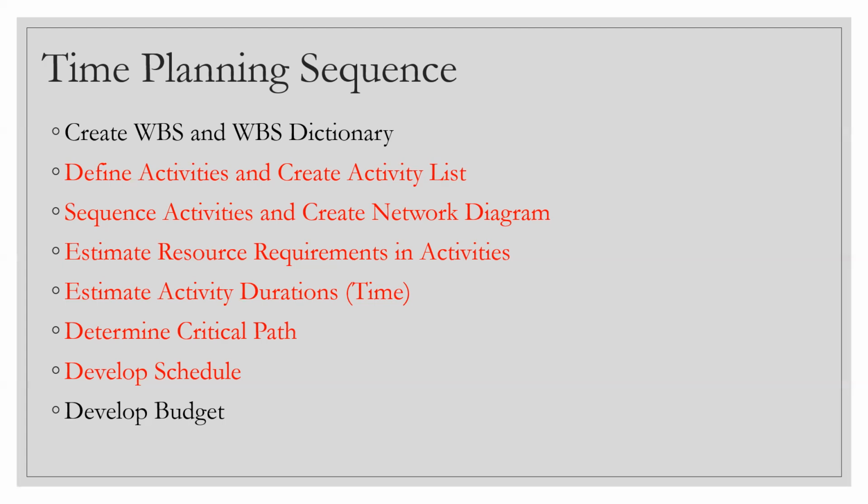And with that, you just have to add the additional hardware or any other sub project which you are doing to complete this project. Once you add up the hardware cost and the man hour cost, you will arrive at the cost of the project. So the services and the cost of the hardware, right? Developing the budget will not take too much time. It will be very simple if your schedule has been done in a very nice way.